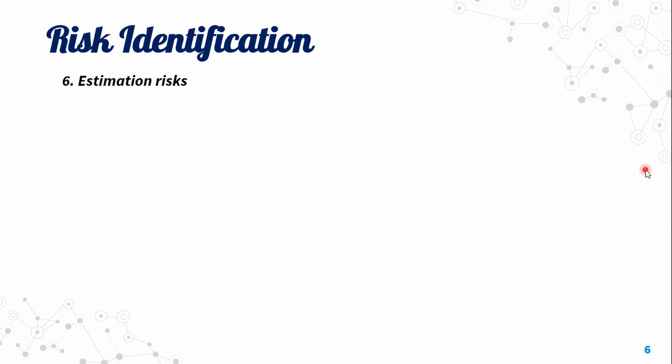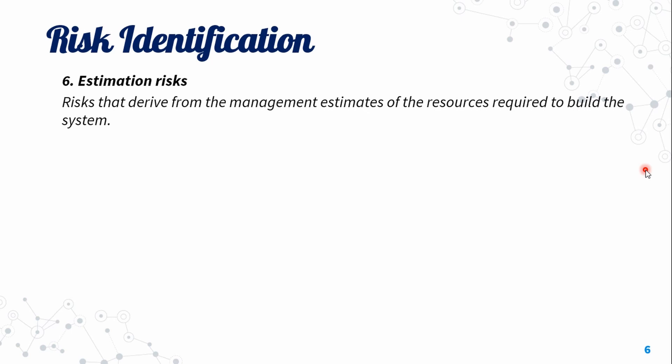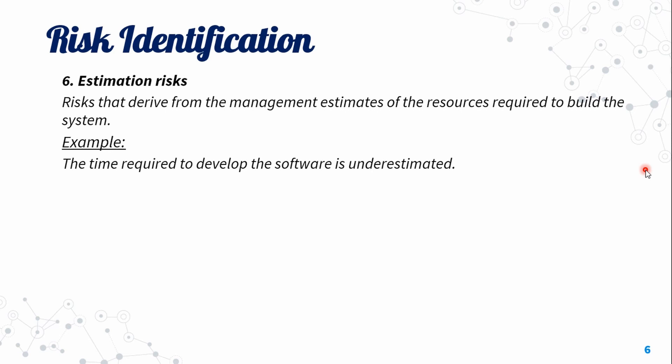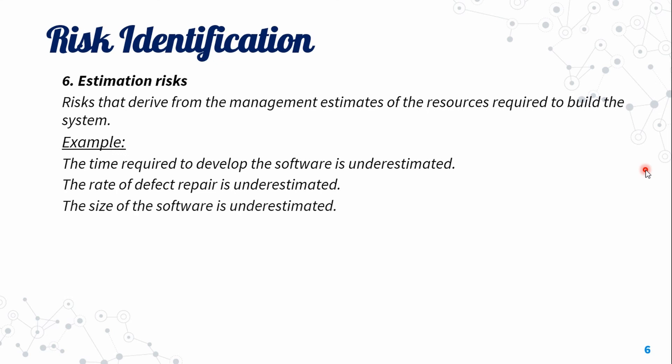Estimation risks are risks that derive from the management estimates of the resources required to build the system. For example, the time required to develop the software is underestimated, the rate of defect repair is underestimated, or the size of the software is underestimated.